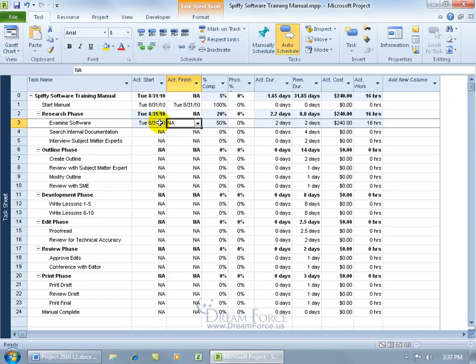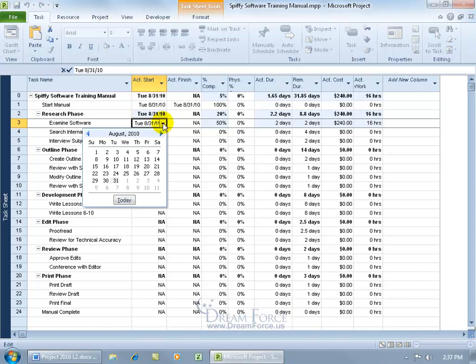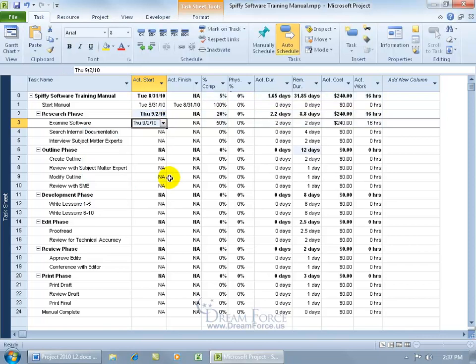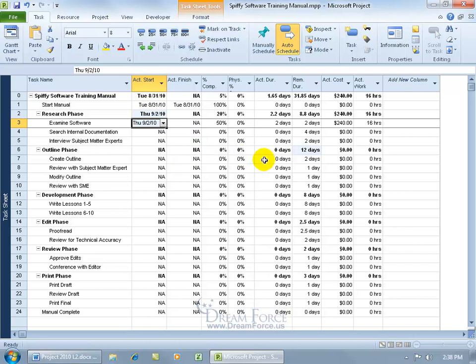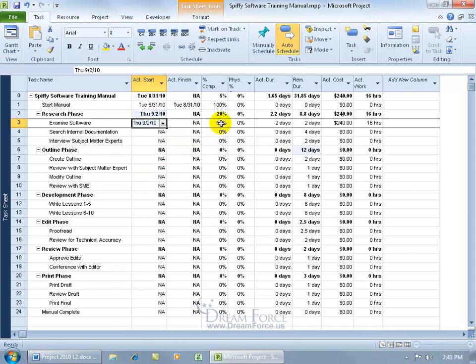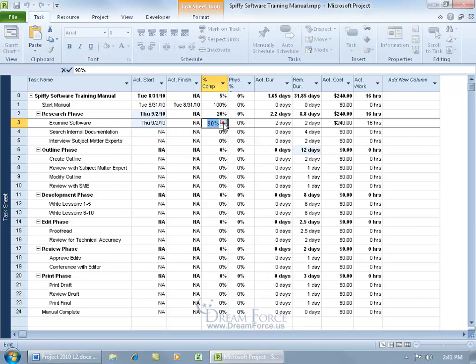We're halfway through, and let's say we actually didn't start on the 31st, let's click in there, click on the dropdown arrow, and say we started 2 days later, select that, and then notice the outline phase goes from 14 to 12 days. That's playing along with the changes that we make up here, in the effect that, now that we're starting later, these two start a bit later. In other words, these two will start closer to the constraint date of this task that can start no earlier than September the 22nd. So the phase for these subtasks here get reduced. So you see the difference between the plan, what you have set, and what is actually happening.